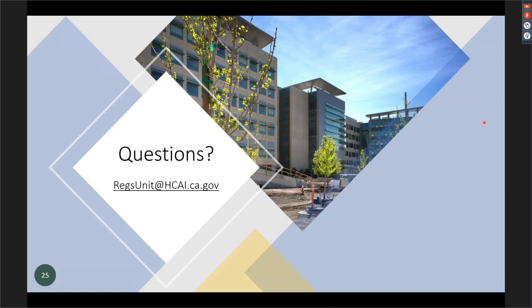When I'm thinking of reference drawings, I mean a set of drawings that's uploaded, the whole set. I would expect that you provide the drawings and the sketches related to what you're changing. Again, as Caesar mentioned, if you're referring to another detail or an elevation, I would expect that detail or elevation to be included as part of the NMA. I wouldn't call that necessarily a reference drawing though, but you definitely want to include it, because you want to make it simple for us.